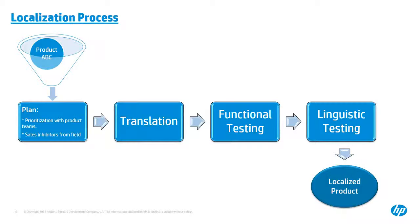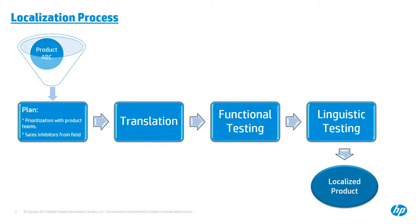Okay, let's have a quick look of a typical localization process of one product. For example, we have a product ABC in plan for localization, and our globalization project manager and a corresponding product manager will initiate the discussion about the resource prioritization as well as sales inhibitors. And then to decide the general scope of the localization, like how many languages for UI, for doc, and timeline.